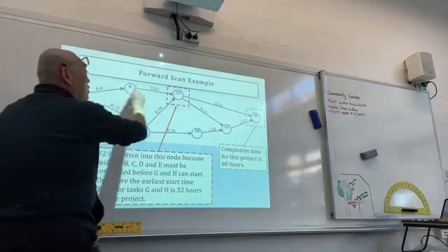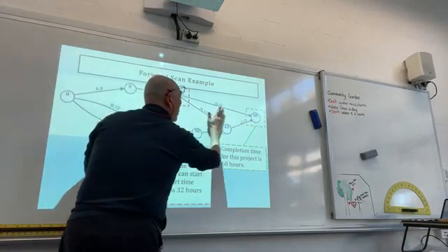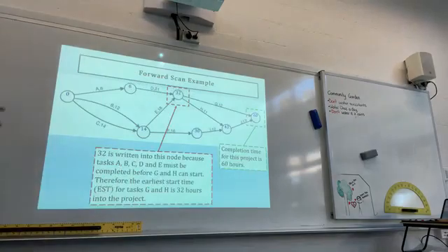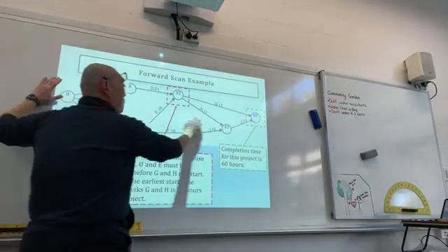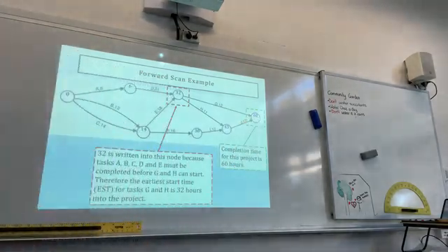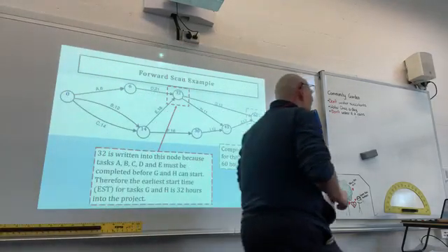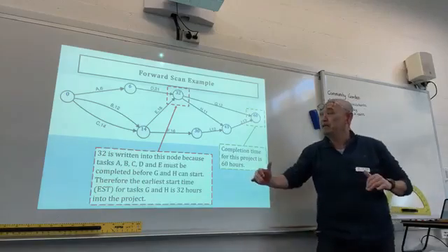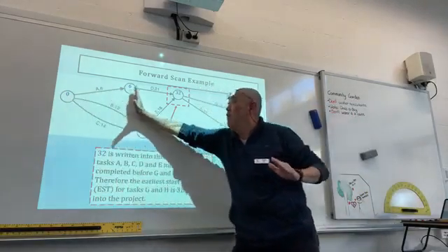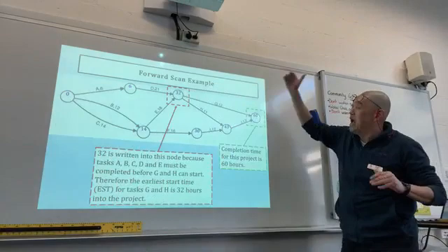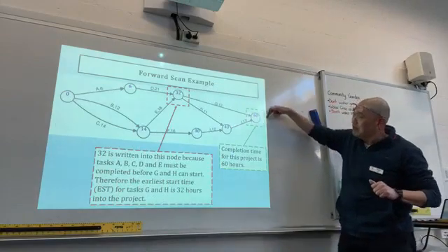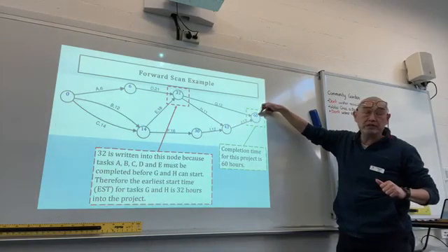All right. So this is the process I go through, going through the whole network until I find the completion time, 60 hours, minimum completion time, 60 hours. Everyone happy with that? So you would have tried some exercises over the weekend. Now, the process I've done is called the forward scan, moving forward and actually achieving the minimum completion time.